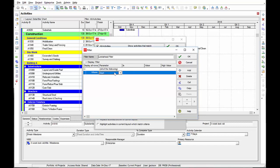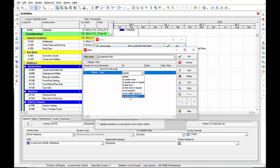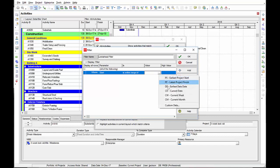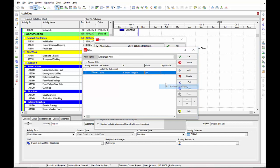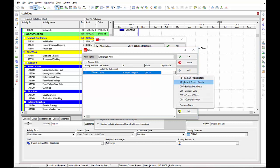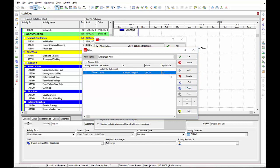One, the start. The start is within range of. This is the bottom selection on this menu is within range of and I want to select my data date minus one week minus one week minus one W. A good look ahead schedule usually looks back one week as well. My high value is going to be my data date plus three weeks plus three W.